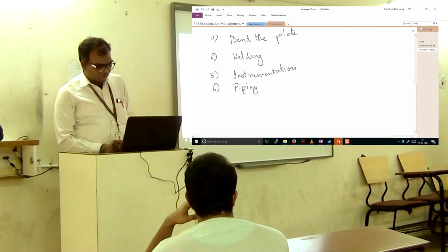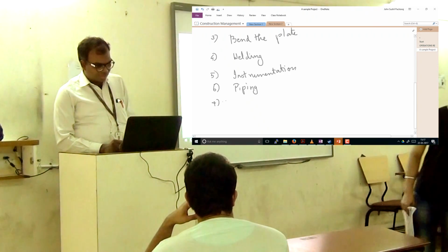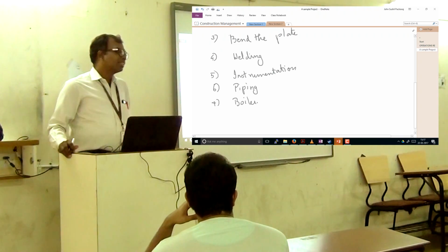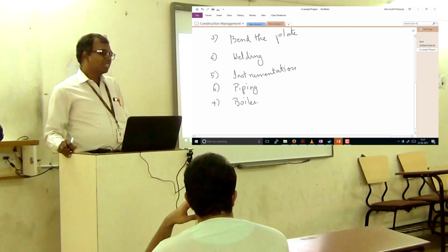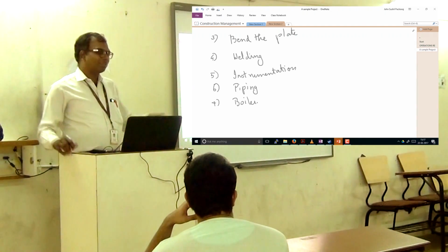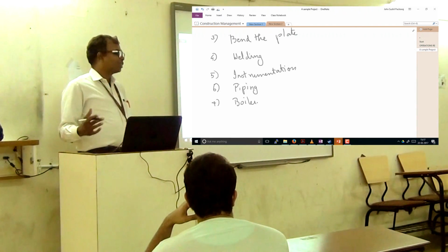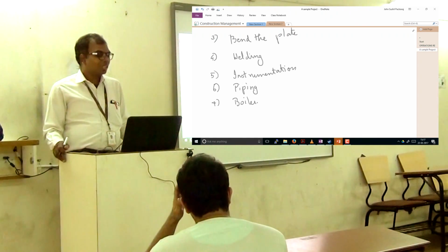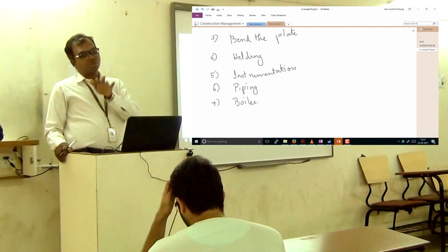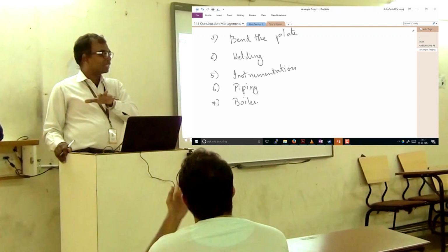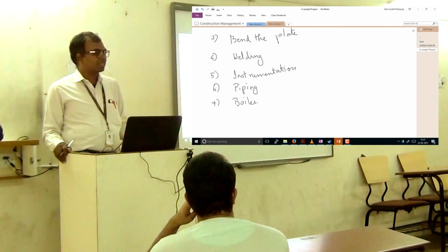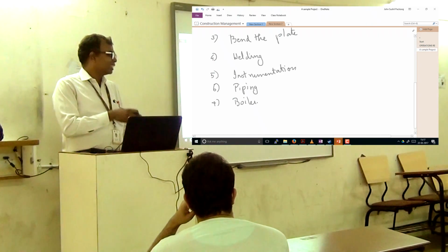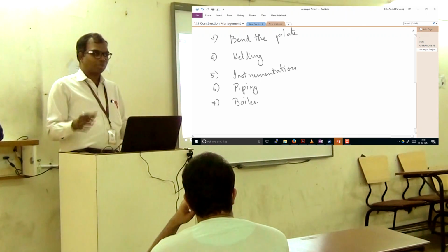In fact, my brother is a specialist in welding. He works for Godrej Boyce. For the welding part, they bring gas in bullets. They cannot afford to use the gas cylinder or anything because of the amount of gas you consume. So it means that if you're going to have a boiler fabricated, or any vessel for that matter, you need to understand whether the raw material, including the gas, is available for all the processes.